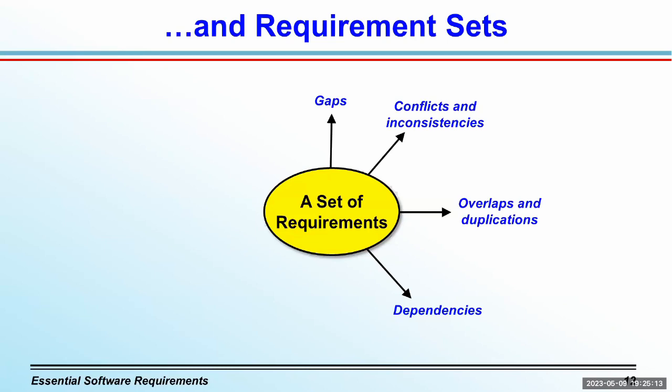Some requirements depend on others being implemented at the same time or previously. For instance, it only makes sense to implement exception handling code concurrently with the functionality where the error could occur. So beyond the desirable characteristics like completeness and consistency I mentioned earlier, be sure that groups of requirements are written and labeled in a way to be modifiable and traceable as part of your quality assessment.